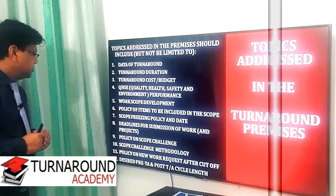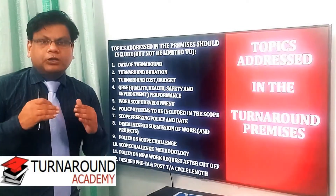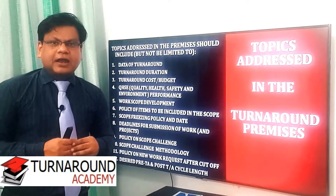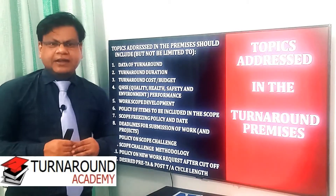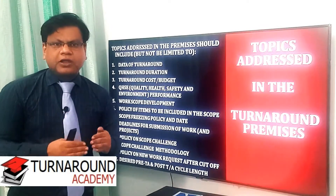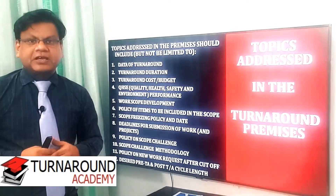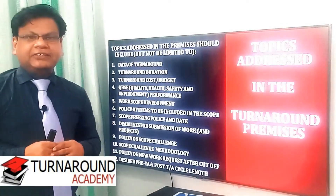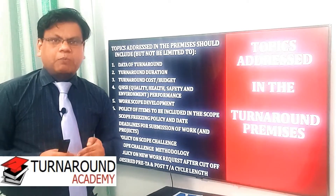Continuing the list of topics in the turnaround premises: number seven, scope freezing policy and date — management will give the scope cutoff date; number eight, deadline for submission of work including projects — management will give a deadline by which all stakeholders must include their scope of work; number nine, policy of scope challenge — management will give guidelines in the turnaround premises; number ten, scope challenge methodology — what methodology to follow while doing the scope challenge, with guidelines provided by management.